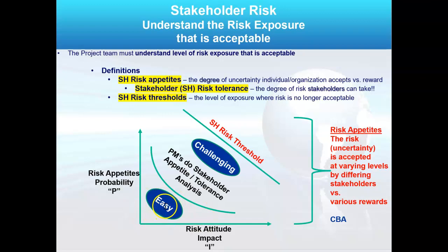Now, there are some things above the appetite that we're willing to do if we have mitigations in place, right? If you're going to be working 6 feet off the ground, you've got a harness, it's strapped to a pole that won't fall down, that catches you, right? So that would be a risk tolerance. You could expand your daily appetite to this risk tolerance because you took some mitigations.